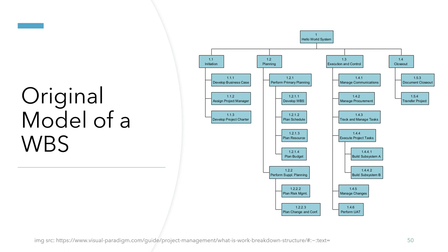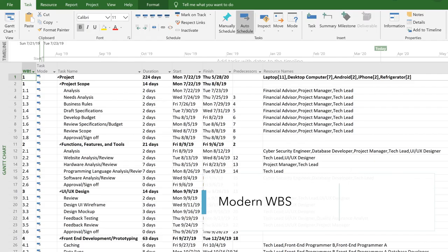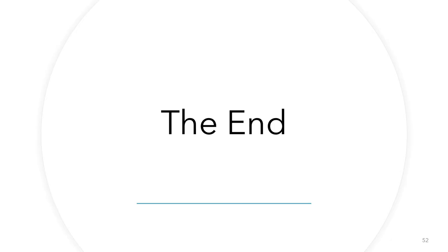Here is the original model of a work breakdown structure — you can see how some tasks are split into smaller subtasks. This is a more modern work breakdown structure that I made through Microsoft Project. You can see the work breakdown structure on the far left column, along with tasks, duration, start and end times, which tasks precede which, and resources such as materials or workers. There are also many other interesting features in Microsoft Project, making it a very powerful tool for project management.